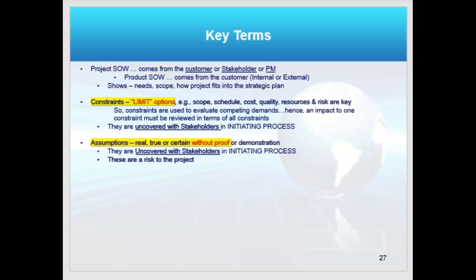So once I'm done with a management plan and it's formalized and integrated, it now becomes a constraint on the other management plans. Once the budget is done, the budget will constrain scope, schedule, quality, how many quality engineers I can hire, etc., right? How much I can do in procurements. They become constraints on each other.